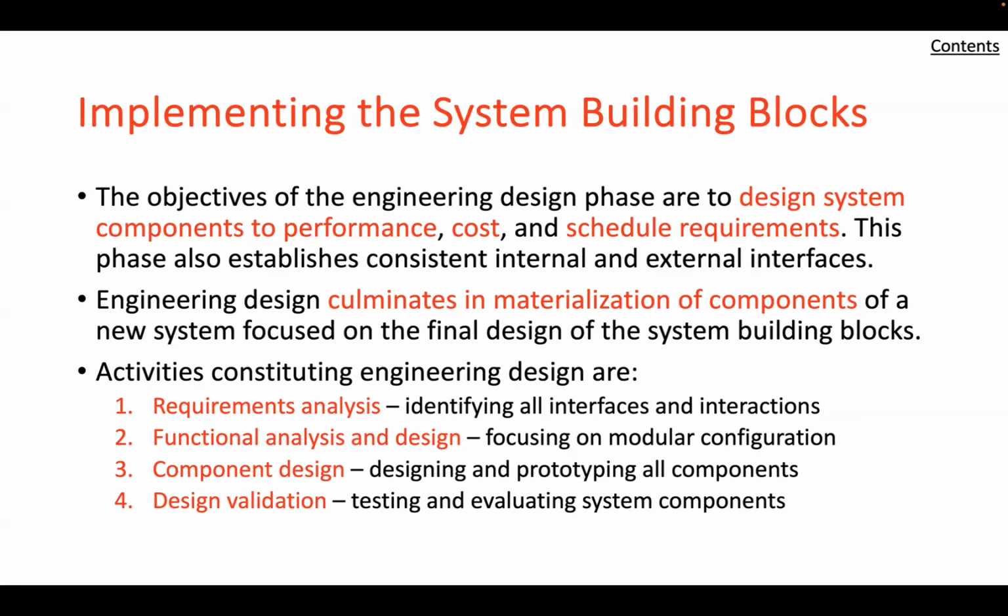However, experience in developing complex new systems has shown that some unknown unknowns almost always escape detection until later, revealing themselves during component design and integration. Such eventualities should therefore be anticipated in contingency planning from the engineering design phase.